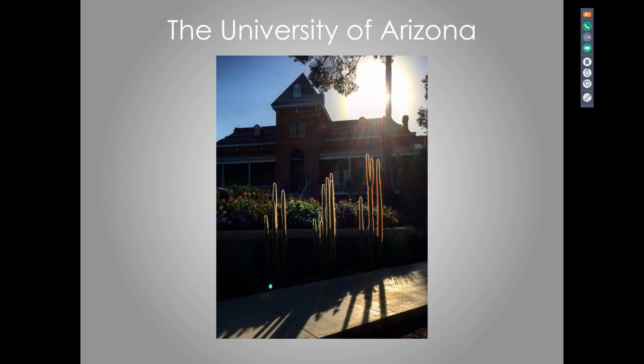We do a 10-year analysis and then make sure we have plans with our utility capacity review that's done every 4 to 5 years. And then we use that as a roadmap to secure the funds. And as Wayne had mentioned, prioritize those key items before it's critical failure. Because the trick is always the continuity of operation at our universities and colleges. We don't want to see the disruption. We want to see that we have solid plans in place.